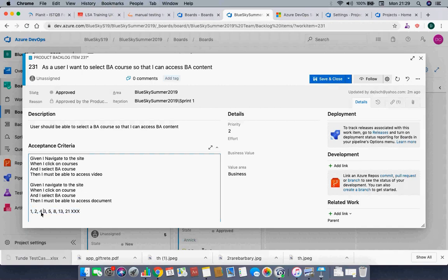Why did they do that? Because you can see 4 is not part of it. I think the concept is that at this level the granularity is small, so it is okay. You can say it can take me 1 day or 2 days or 3 days. But at this point, if you say 4 days, in most cases there's no difference between 3 days or 5 days. So you could as well just say 4 days, because it's an estimation. Your effort is just an estimation. So why say 4, when you can actually decide whether 3 or 5? The same concept is applied there also.